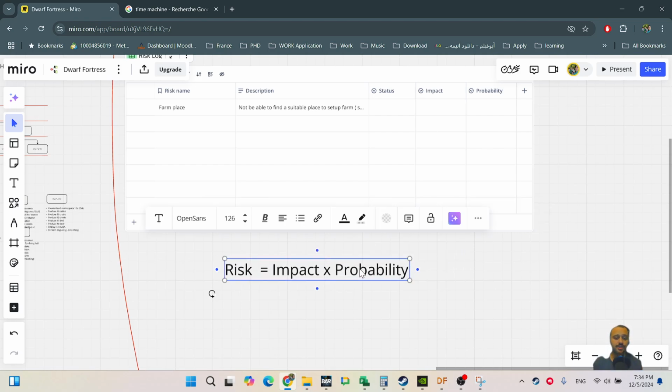We have two types of risk analysis: quantitative risk analysis and qualitative risk analysis. Quantitative risk analysis involves identifying the probability equations. You need to do mathematics, you need to know statistics to calculate the risk value, and it requires huge effort and huge work.